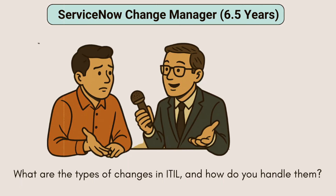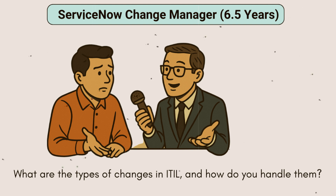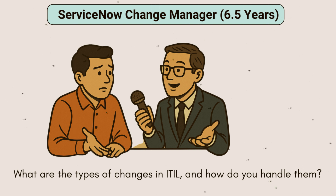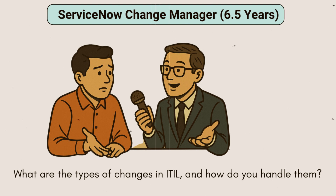Okay, good. What are the types of changes in ITIL and how do you handle them? Sure, sir. So basically, there are three types of main changes. First one is a standard change. Then we have normal change and emergency change. So standard change is a type of low risk — these are repeatable and pre-approved changes. For example, scheduled password reset or deploying a printer driver.